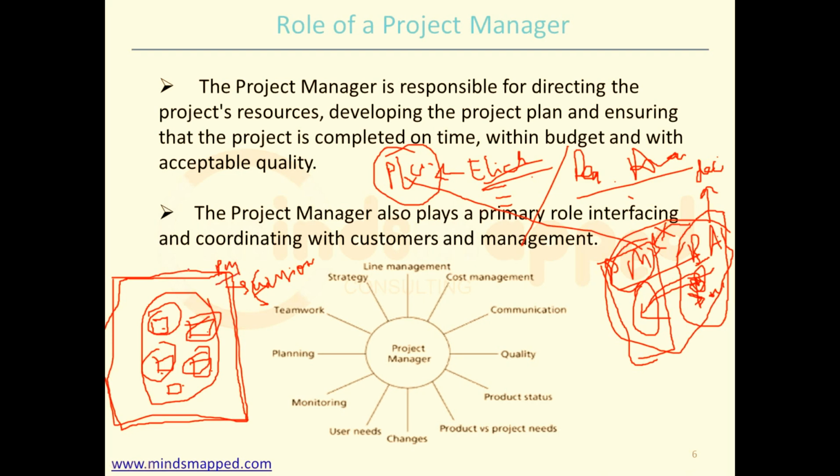They would be the ones creating the project plan. You will be the one planning the requirements. So when you say that this would be done in 10 days, these 10 days would be part of the 200 days which the PM has decided. What all deliverables you would be giving in each and every requirement would be part of the complete project plan that has been decided by the project manager.